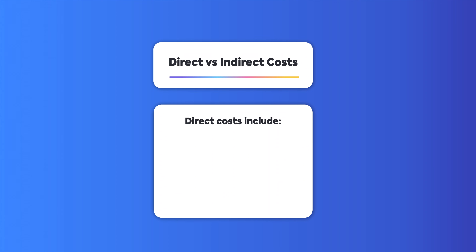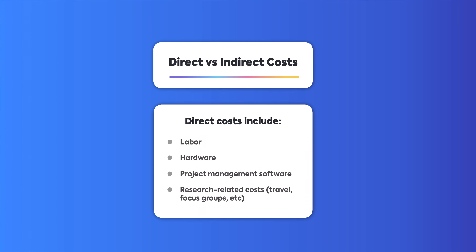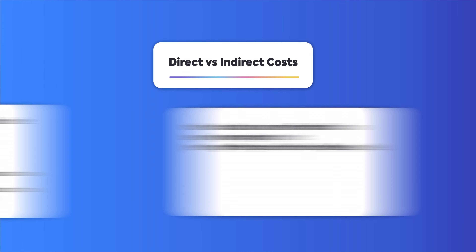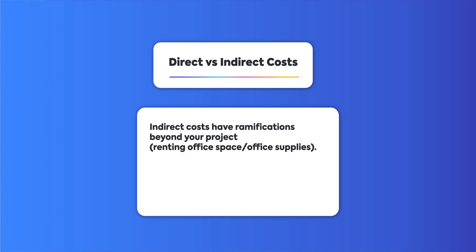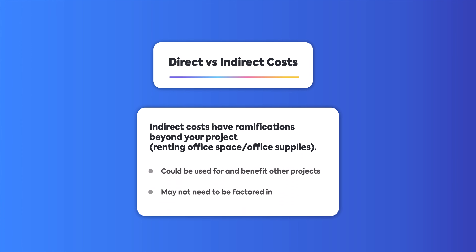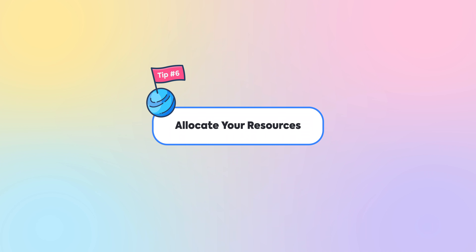Each budget will also have direct and indirect costs. Direct costs include labor, hardware, project management software, and any research-related costs like travel or focus groups. Indirect costs, on the other hand, have ramifications beyond your project, like renting office space or office supplies. These costs could be used for and benefit other projects too. Depending on the project, these costs may not need to be factored in.